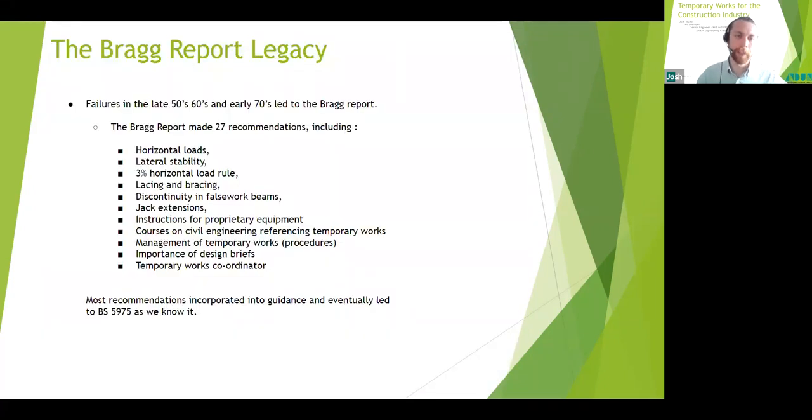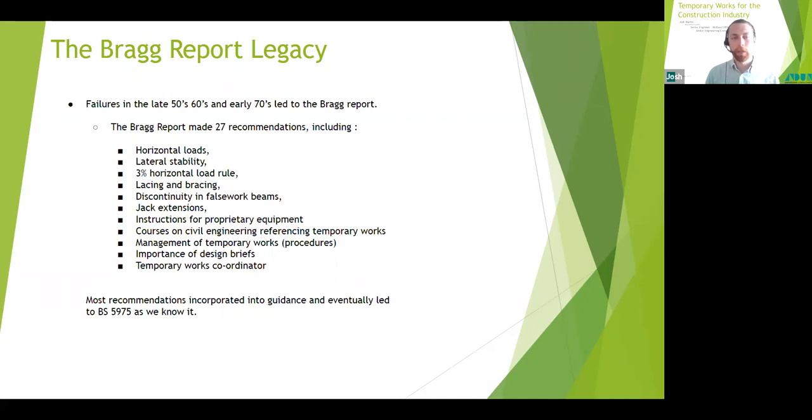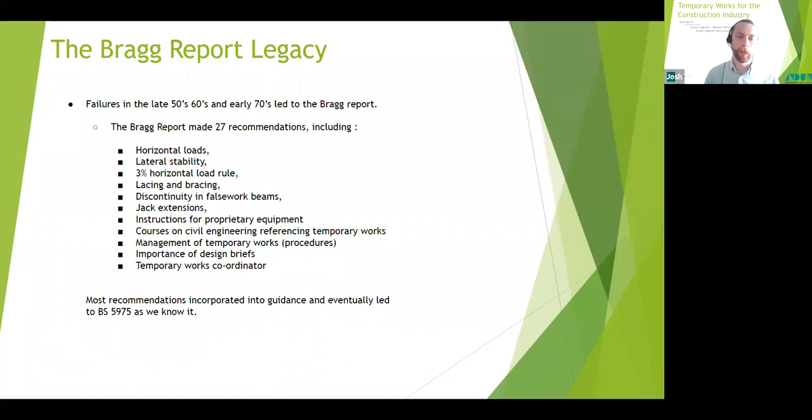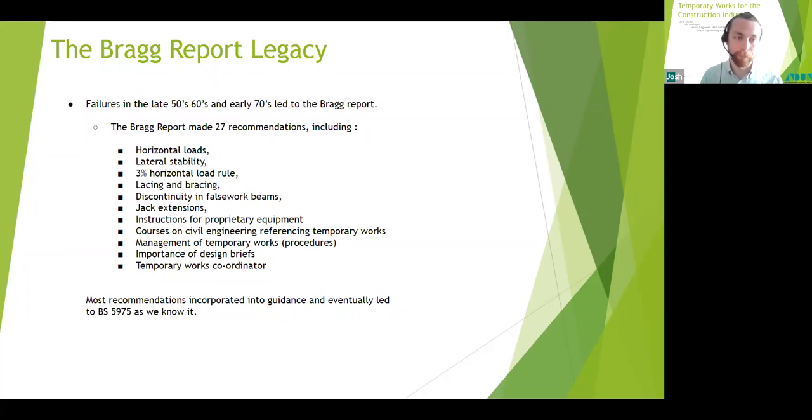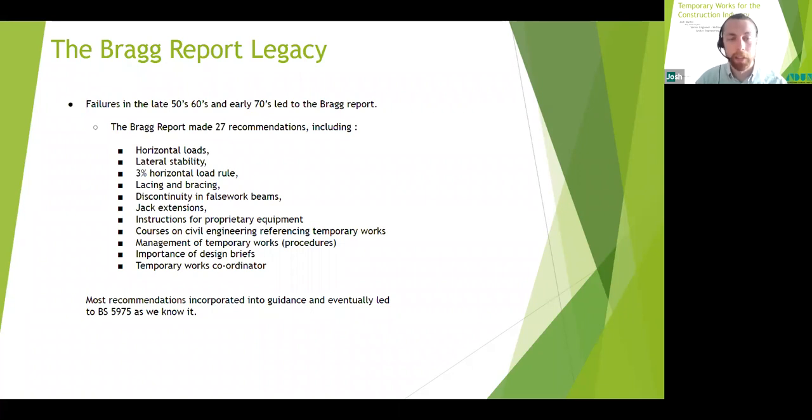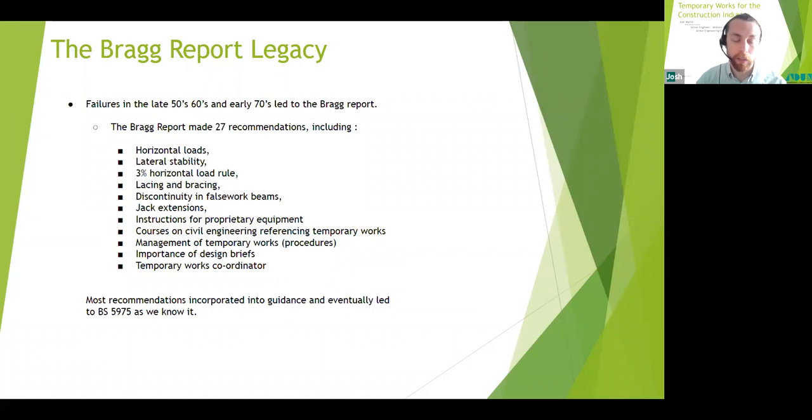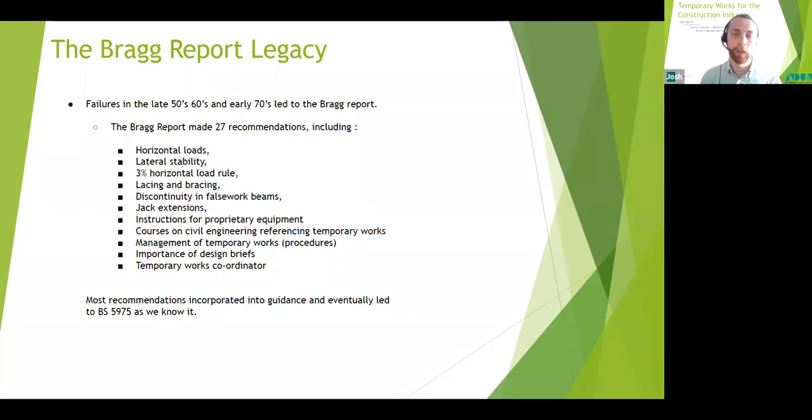So during the 50s, 60s, and 70s there were a number of large-scale collapses that were the results of poorly planned temporary works. This led to industry leaders sitting up and thinking that we must do something to tackle this issue. This led to the Bragg report, which reviewed the failings in the construction industry as it was and identified a number of recommendations. Most of these recommendations were incorporated into the British standard of the temporary works, and I have listed some key ones here. We've got horizontal loads looking at lateral stability or minimal lateral stability of structures, lacing and bracing, the use of proprietary equipment and their instructions of use, management and procedural control of temporary works is a key one. In fact, a large portion of BS 5975 is dedicated to how temporary works should be managed on sites and what procedures should be in place to help reduce errors and also have the best chance of spotting them before they lead to a potential failure.